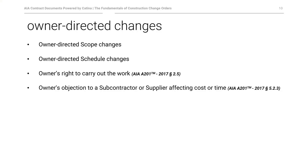Let's examine the causes and impacts of change orders. Keep a mental track and ask yourself: is that a negative change to the contract? We'll start with owner-directed changes. The owner could change the scope of the construction contract during construction — with upgrades or a tenant fit-out. These can be easy scope changes and are all positive things. The owner could also add milestone dates, lease obligations, or tenant opening requirements that affect the schedule and therefore impact change orders for both the contractor and designers.